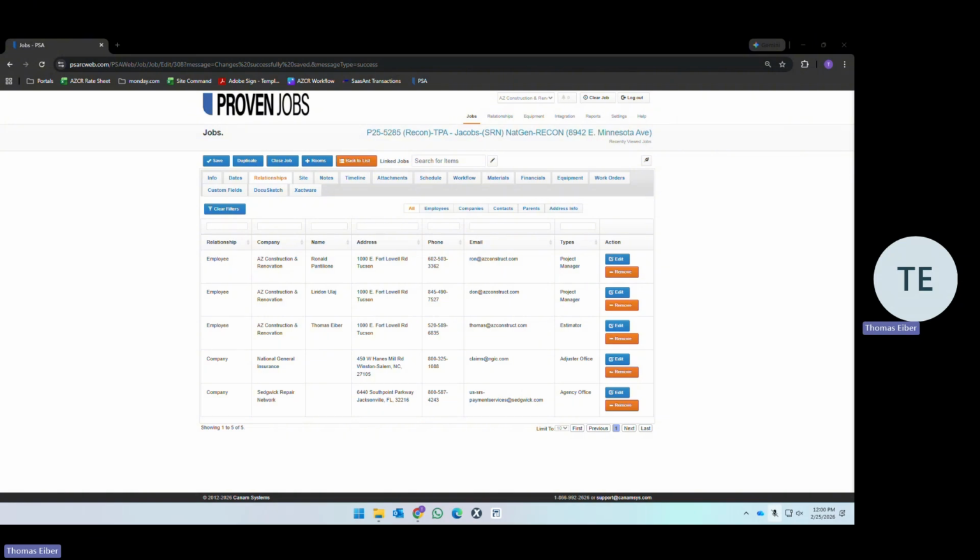Your expectation is 95% of your jobs have an on-schedule percentage completion. So if changes happen, communicate quickly so that the schedule can change. So you can be held accountable to that 95% on-schedule completion and have it be fair and accurate. You are expected to have effective field oversight.